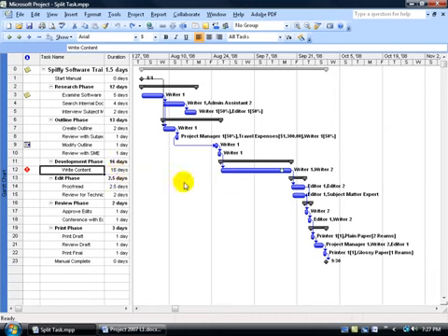So where it takes 16 days to complete all of it, if I can have Writer 1 write his first 5 lessons in 8 days, and then on the second task, lessons 6 through 10, have Writer 2 work on that for 8 days, and again starting at the same time, they'll both finish at the same time within 8 days, thereby cutting back the duration of when the task will be completed because I broke it down into 2 tasks, or 2 smaller tasks. Let me show you what I mean.